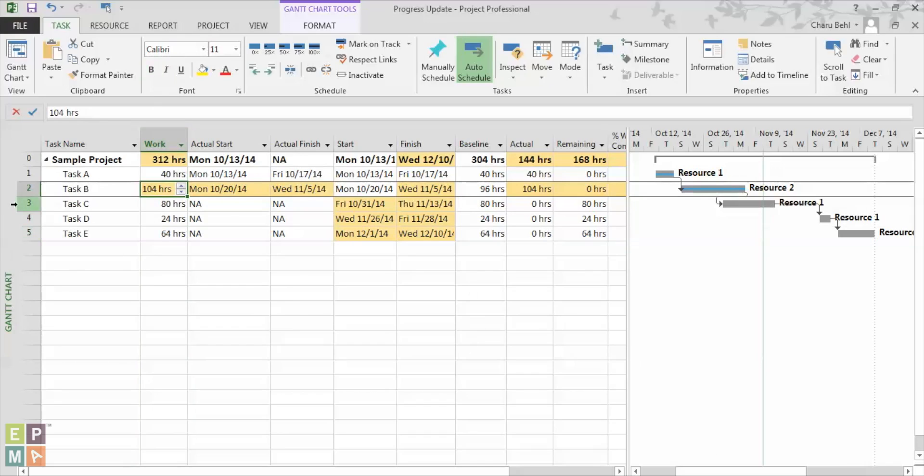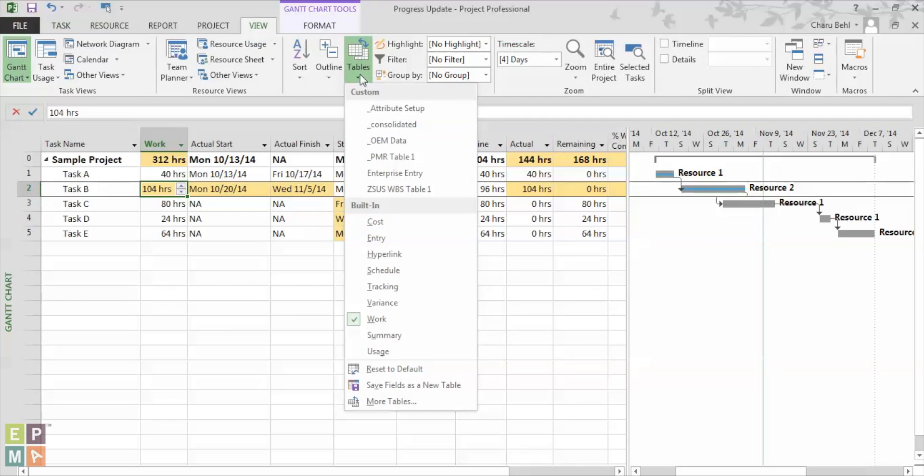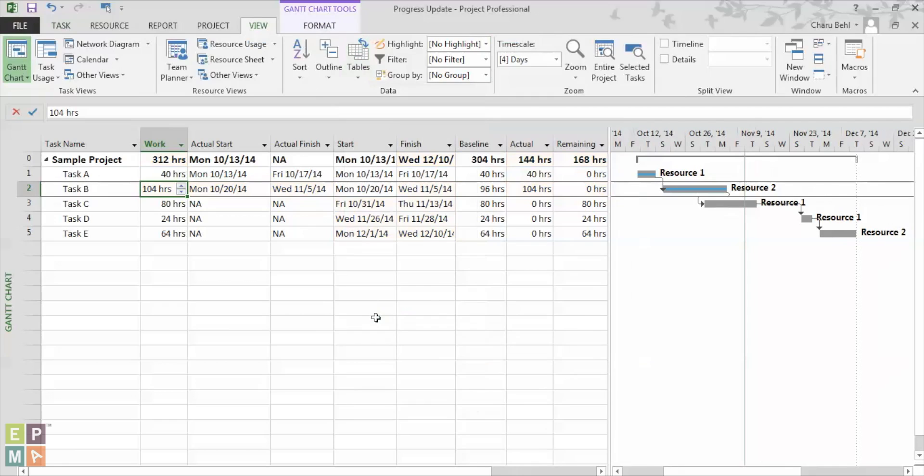Now the third method is called the actual work per period and it is a measure of actual work performed during each time period, which may vary from a week to a day to a month, depending on your organization and the estimated number of work hours remaining. Now to do that, I would again go under the view section and under the table drop down menu, I would select the work.